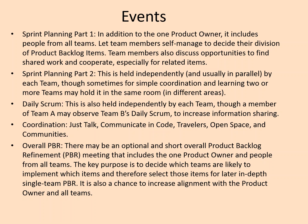Then there is overall product backlog refinement — an optional and short overall PBR meeting that includes one product owner and people from all teams. The key purpose is to identify which items the teams will implement and select those items for later in-depth single-team PBR. It is also a chance to increase alignment between the product owner and all teams, ensuring everyone is on the same page and understands the requirements clearly.